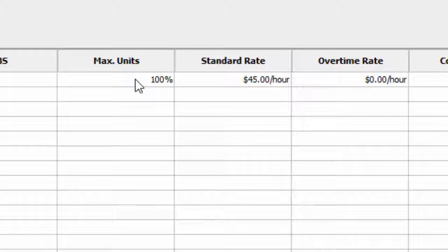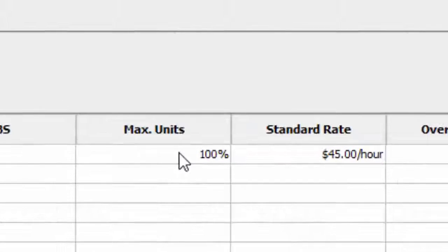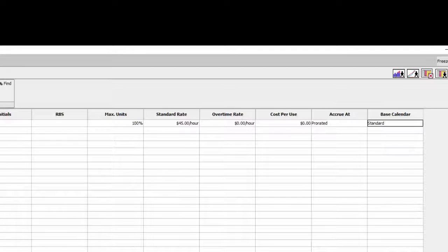The Project Libre program is open source, and it does not allow us to put people to work for less than 100% of the time. So if a person works for us for a day, we expect to get a full day's work. Other project software like Project Pro allows you to select different percents of the day that a person works, even though he's assigned the whole day. As of now, we can't do that. So all of our people will be assigned to work 100% of the time that they're assigned to work. That's the way it ought to be anyway.